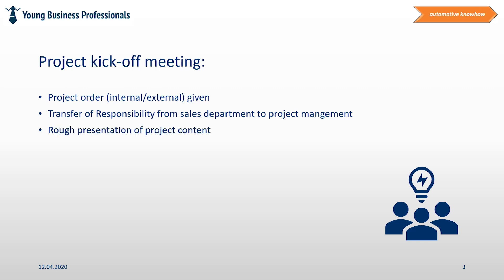The majority of the participants were already involved in the RFQ phase before. But in case team members are changing, it makes sense to introduce the content again. It's also important to define the real project targets and even more important to define non-targets, as pretty often the project scope is adjusted during the lifetime of the project, and it is important to distinguish the original target from new requirements added later on.